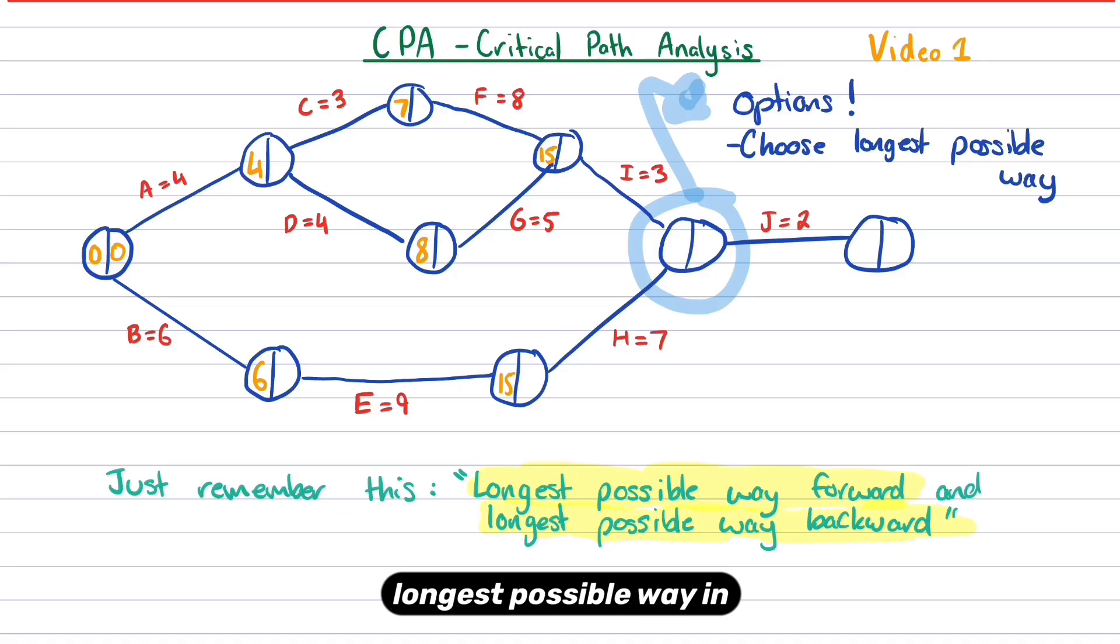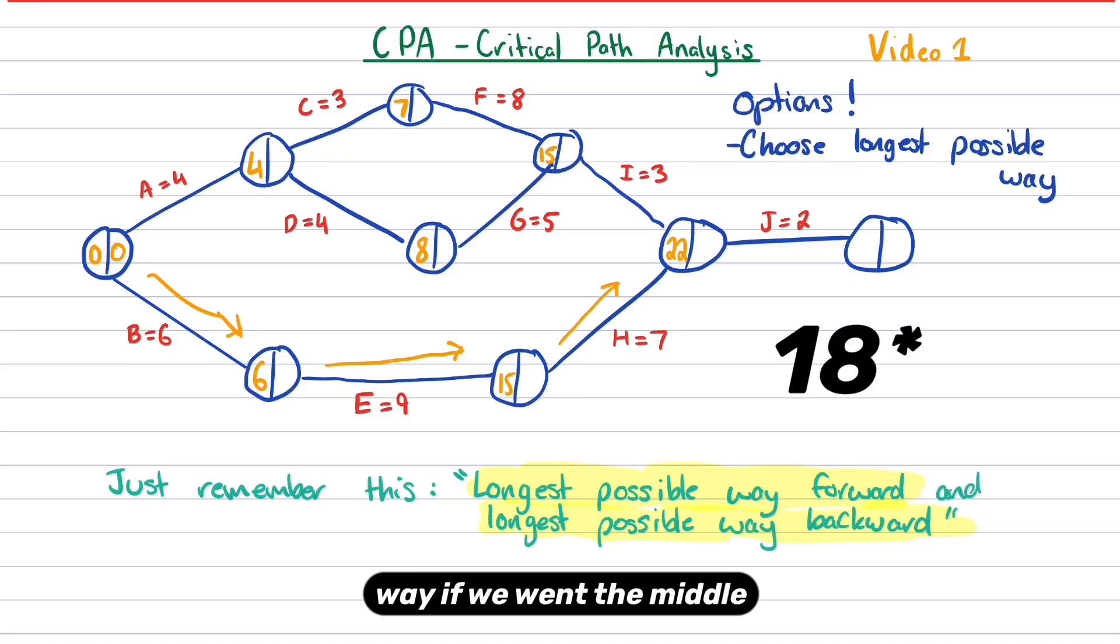So the longest possible way in this case would be six, nine, and seven, because six plus nine plus seven is going to be 20, is going to be 22. So if we had have gone A, C, F, and I, that's going to be four plus three plus eight plus three, which is going to be seven plus 11, which is 19. So that's not the longest possible way.